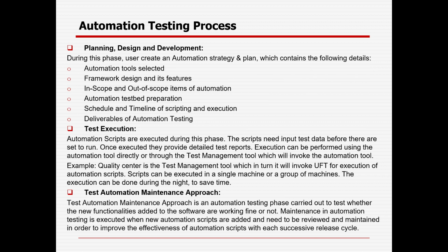Then planning, design and development. You need to do proper planning. Sometimes you need to create the automation strategy and automation plan, where you frame who will be working, what the milestones are, and what the different timelines are. Then you identify the test cases. Then you create the page library and reusable components, and then you automate. You debug your code and do a dry run. After that, your code will be ready.